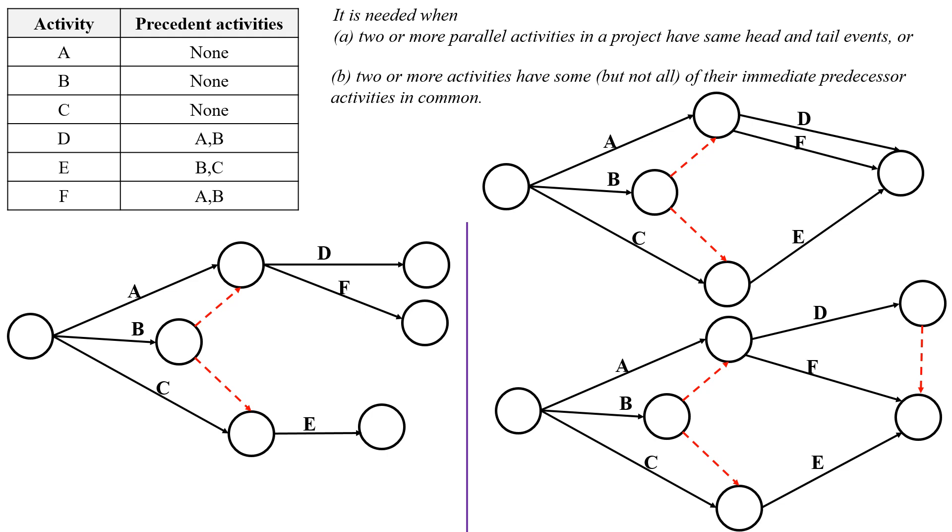Now the network diagram is completed. Give the numbering for the events according to the Fulkerson rules. This is the first event, second, third, four, five, and six. So now we completed the network diagram for the given activities.